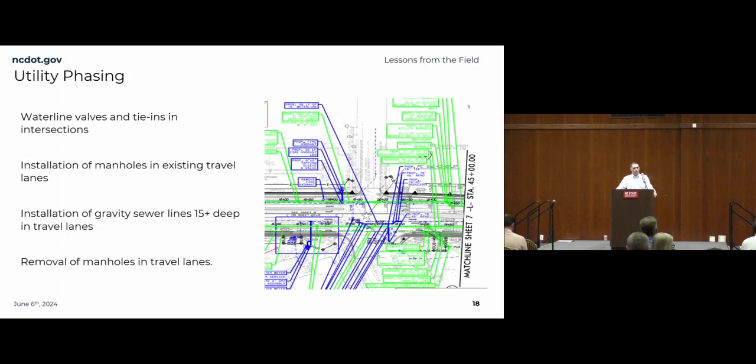Where are we storing our earth material? How are we getting materials in and out of the area? So the phasing starts to become much more important than even a short-term ICT.